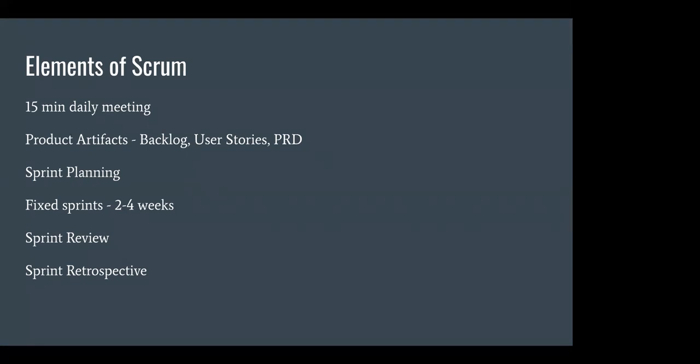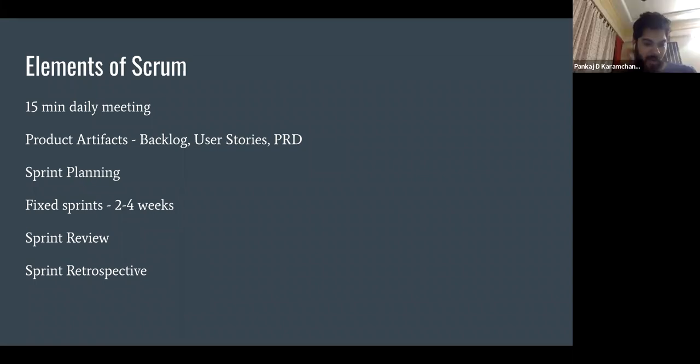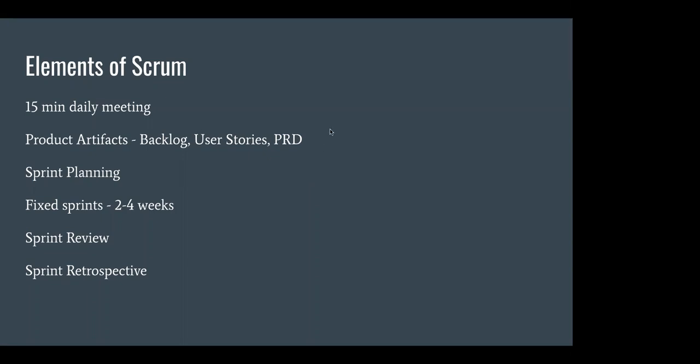Okay. So essentially, like we spoke about in hours earlier, you have 80 hours from your developer in a 2 week sprint. And then you can allocate 30% of those 80 hours towards fixing bugs, technical tasks or optimizations. Correct. So 30% is what we keep for these things.